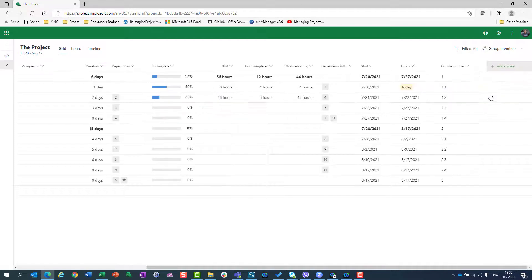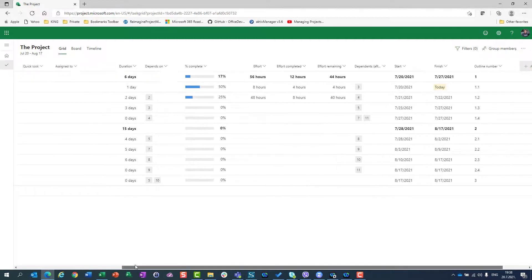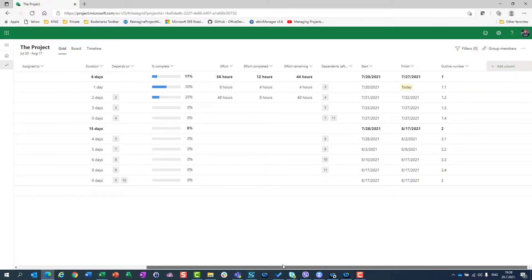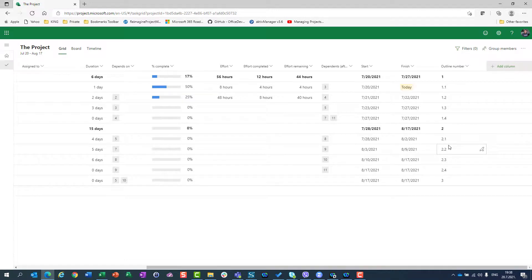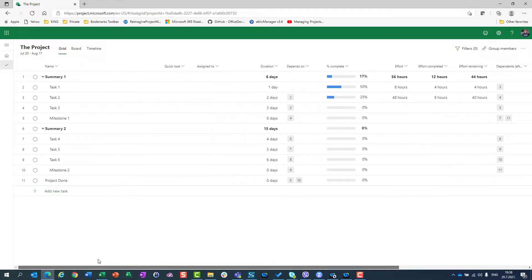Outline Number is similar to WBS — Work Breakdown Structure. For example, you'll see summary tasks numbered 1.1, 1.2, 1.3, 1.4, then task 2 for group 2, and so on. Outline Number essentially gives you the WBS numbering for your project structure.